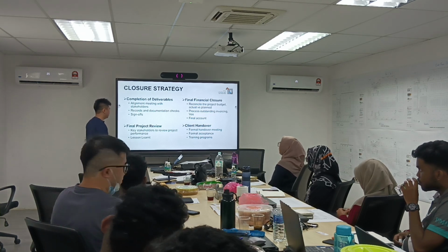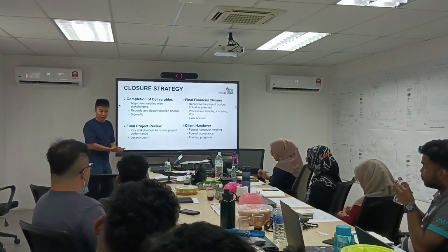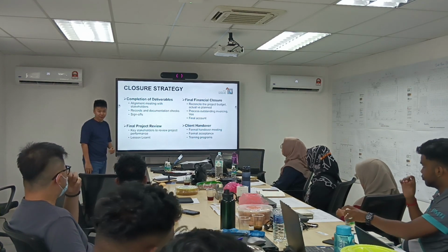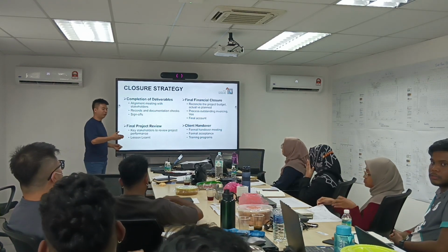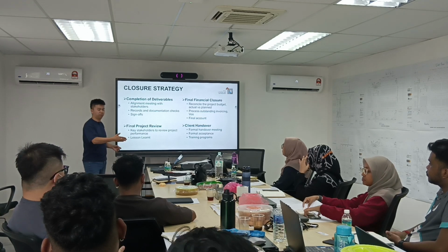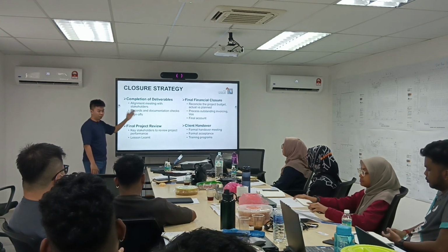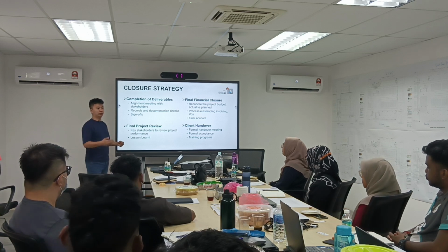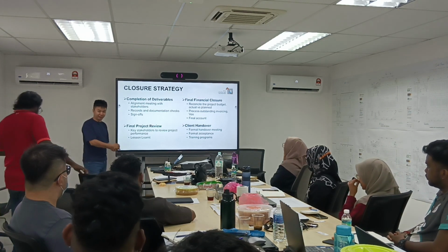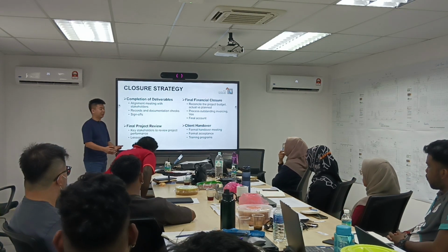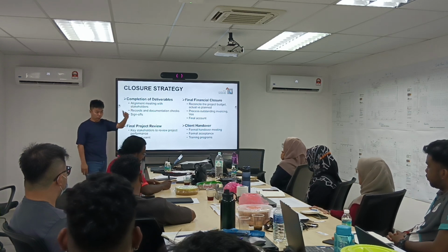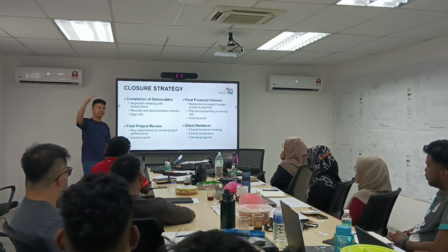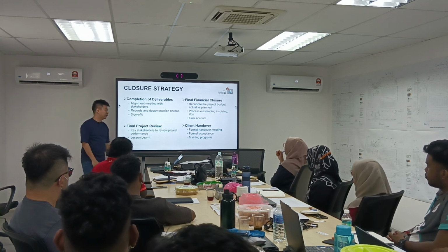So in a proper handover, I think we should have an alignment meeting. Before we finish it, we should talk about what is the expectation of deliverables. So we should sit down with the operation team and the client and say that, look, I'm going to give you this document, this thing, this key, this sort of training, etc.